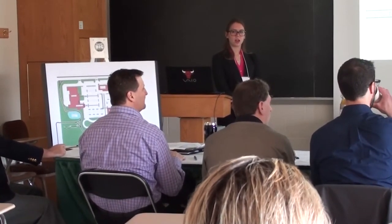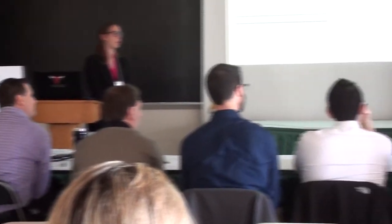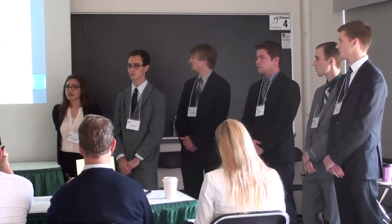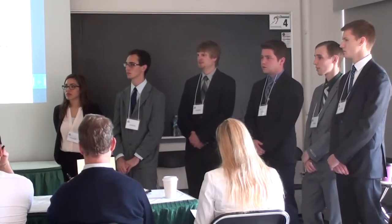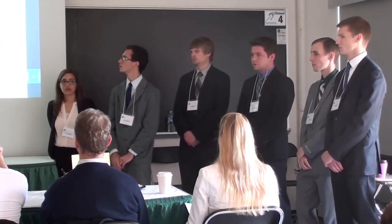In my experience, I estimated around 22 to 23 million for a total project cost. And with Geotech being 1.3 million, it's around 8%. So it's a big number. That is a big number. Somebody sees a 1.3 million Geotech number, we're going to go.